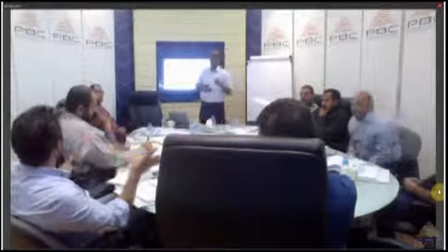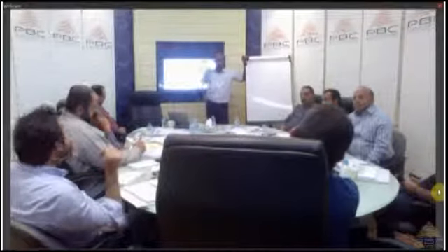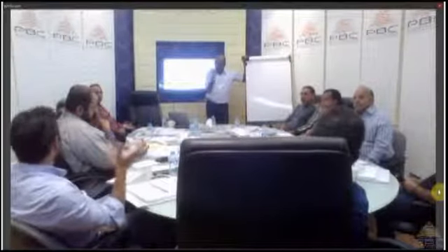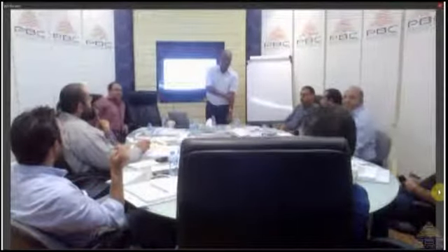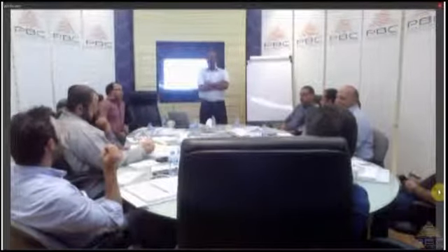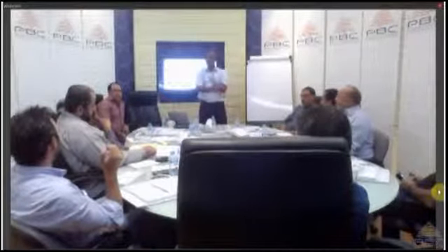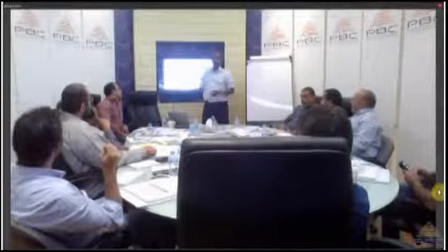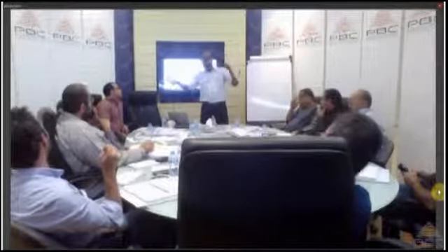Is that prevention or appraisal? It's prevention. It's following up the work, because you want to avoid problems. Exactly, but it's a decision you make. So let's say we don't have that engineer. Site engineer. Exactly. So let's say I, as PBC, decided not to have a site engineer on site, and something goes wrong. What is my cost here? Cost of failure, which could be more than the cost of having a site engineer in the first place.